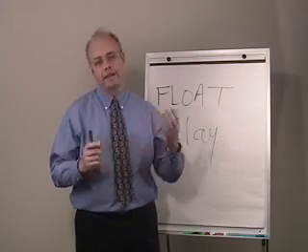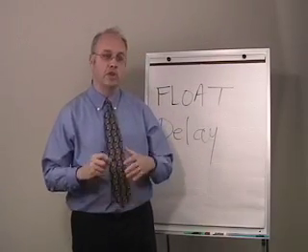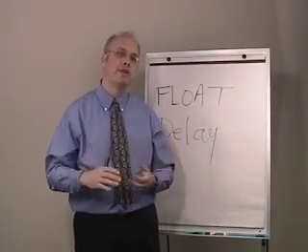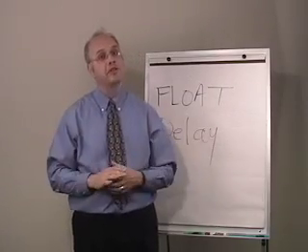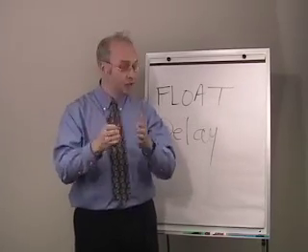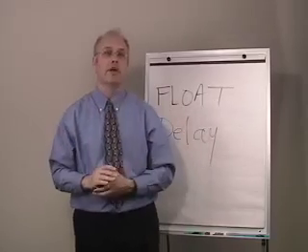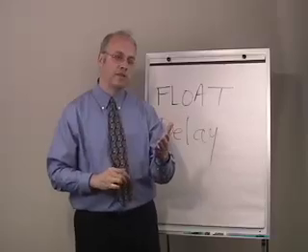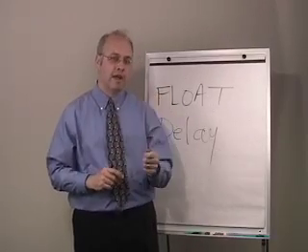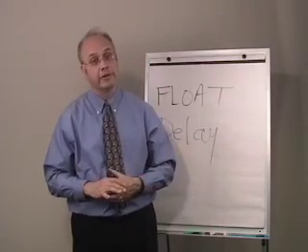The most likely occurrence is probably that your contract is silent about float. If that's the case, then you typically can conservatively presume that that means that float is a commodity available to all parties to the contract on a first-come, first-served basis. If your contract does address float, that's usually how it will be addressed. If not, it will typically say which party owns the float, with the situation probably most common in a subcontractor's contract that the subcontractor has to start and finish their work by early and late dates, which means there really is very little float.